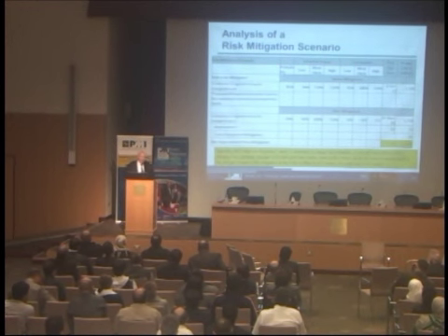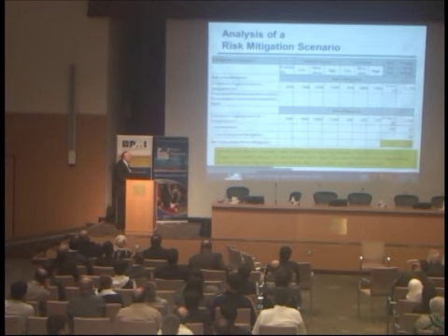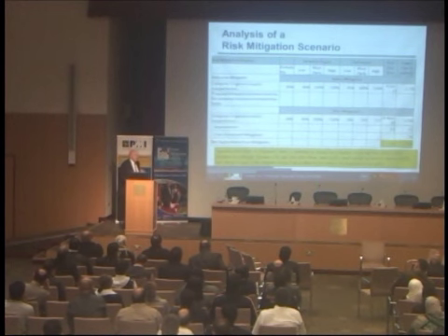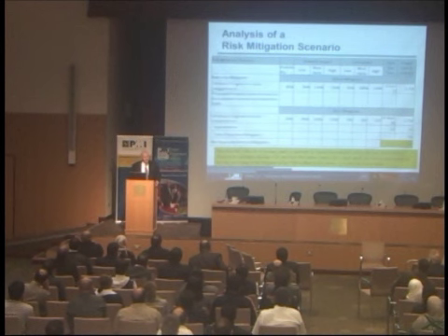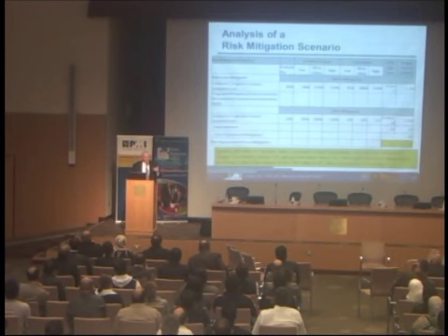So that might help you pay for the mitigation, right? The net cost of the mitigation is $14 million, and you save 53 days. Is this mitigation worth it? Well, I don't know, but those are the kinds of numbers that management needs to be looking at in order to make a judgment as to whether the risk is worth mitigating or whether this mitigation is going to be